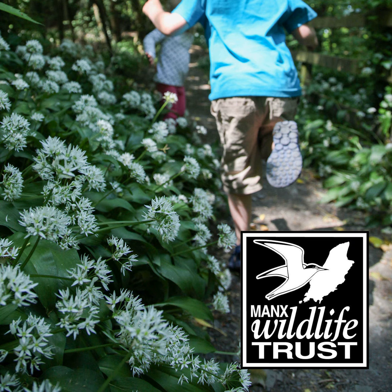And is that a problem you often encounter when you're working in areas like this, where obviously you have a lot of nature, that when you're actually doing the work, gosh, we could be upsetting some of the nature which is already here? Yeah, so we are restricted in the times we can do a lot of the work. During the nesting period, a lot of the work has to stop. And then we have the winter as well, which makes it quite difficult to work in. So we are quite limited for a lot of the bigger works in the time periods we can do that. And so this time of the year, as we're talking now, we're just into October. Is it a quieter time of the year from the point of view of the rest of the landscaping, or what will you be aiming to do between now and next spring?